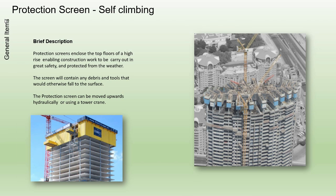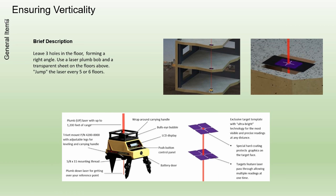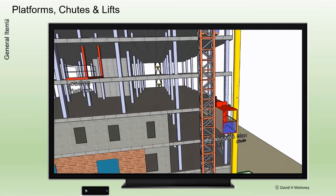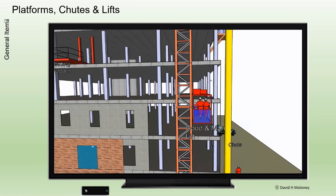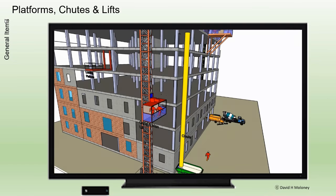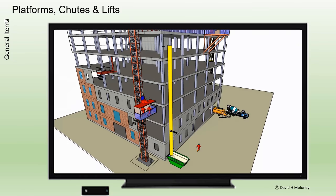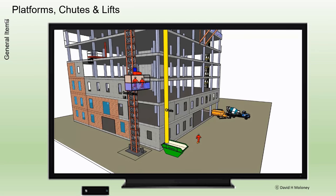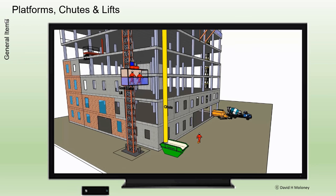Other equipment includes a protection screen, plum laser, platforms, chutes, and lifts. Cantilevered loading platforms are used to move materials on and off floors with a tower crane. Chutes are used to move waste from various floors to skips at ground level. Passenger and goods lifts are used to move workers, materials, and equipment vertically.